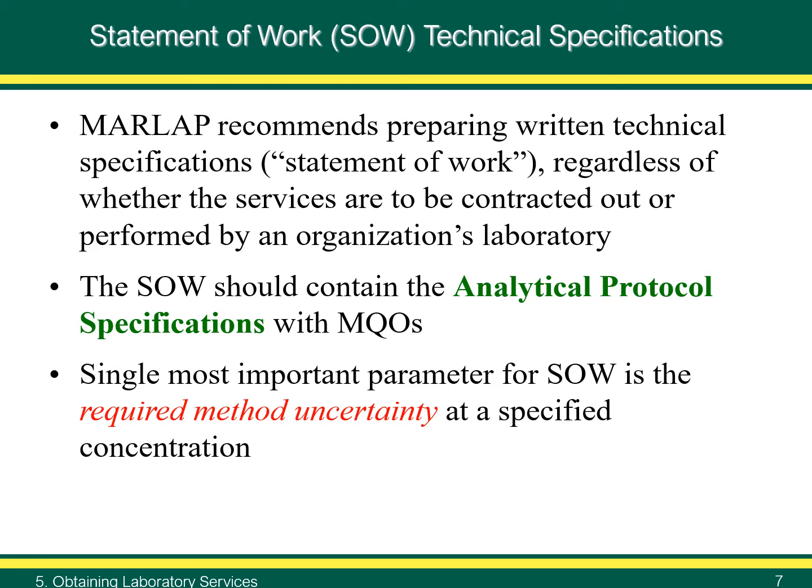Slide 7. Statement of Work Technical Specifications. MARLAP recommends preparing written technical specifications, which could be referred to as a statement of work regardless of whether the services are to be contracted out or performed by an organization's laboratory. The SOW should contain the Analytical Protocol Specifications, or APS, that address the Measurement Quality Objectives, or MQOs.